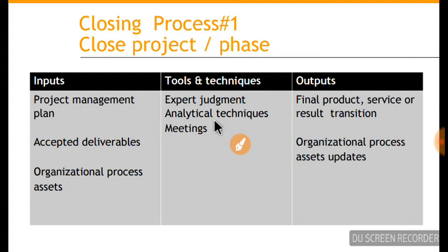The weightages can be based on his timelines. Price is always determined at the time of signing the contract with him. Then it could be the rejection rates of the material supplied. So here we use statistical sampling, weighted averages, scatter graphs, and it could be anything. All these things are examples of analytical techniques.